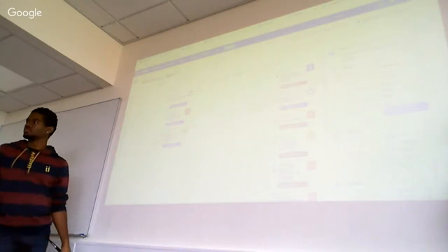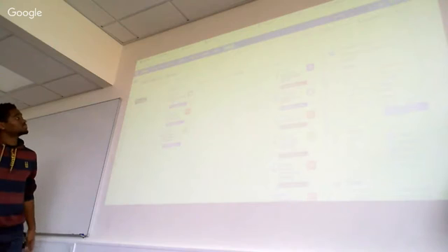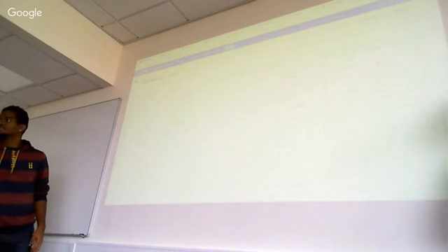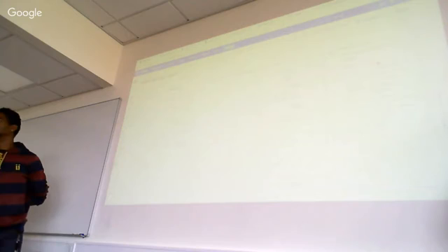And if you go back to the burnup chart again, the shape of the chart is not very uncommon to see, especially at the beginning of these projects. You see the total going up as well. As I said, one reason could be that we closed something that wasn't really ready for closing. So that's something we're going to talk about with testing and code review, what we need to do to make sure that it's not prematurely closed.